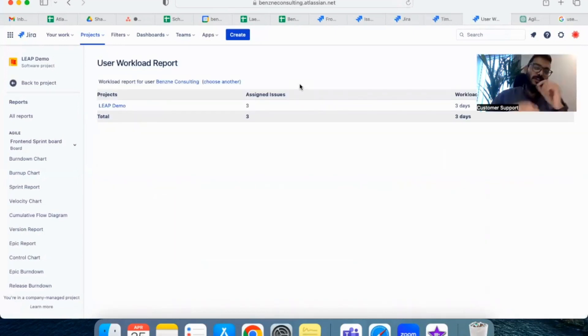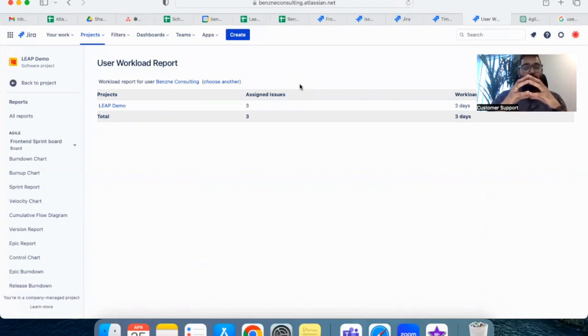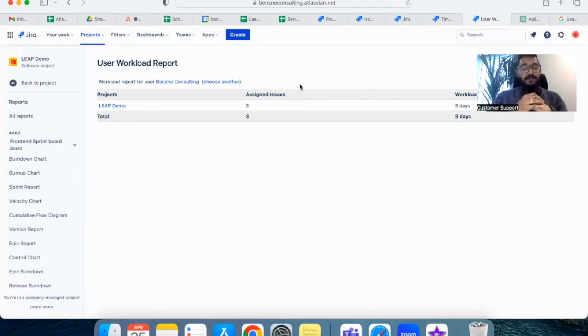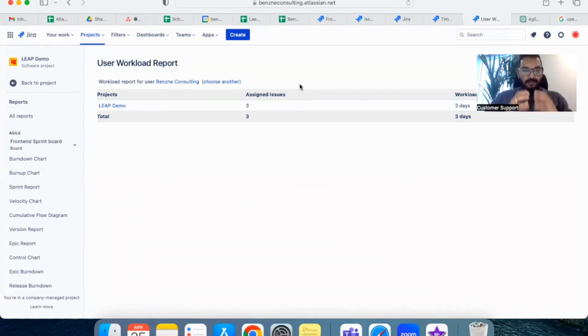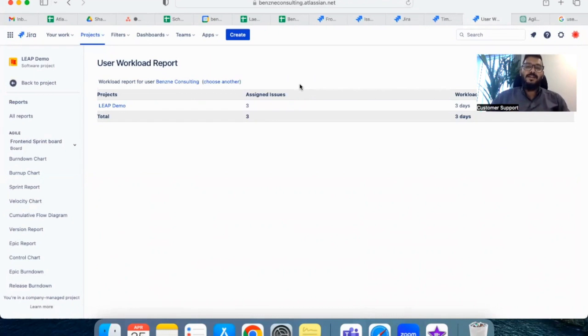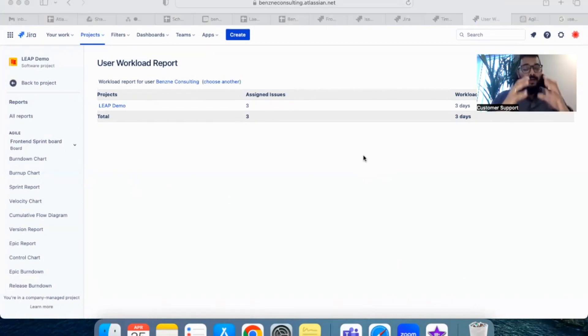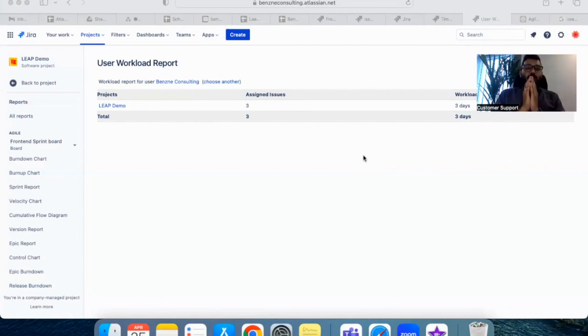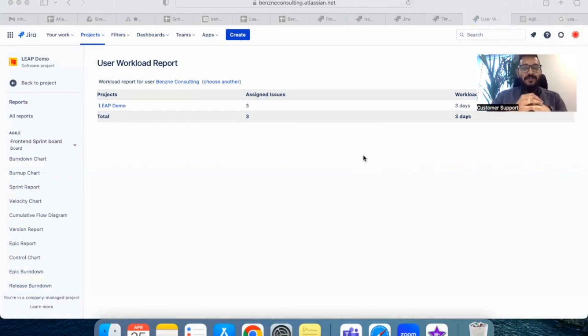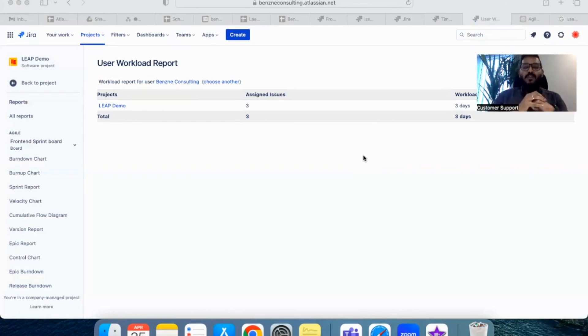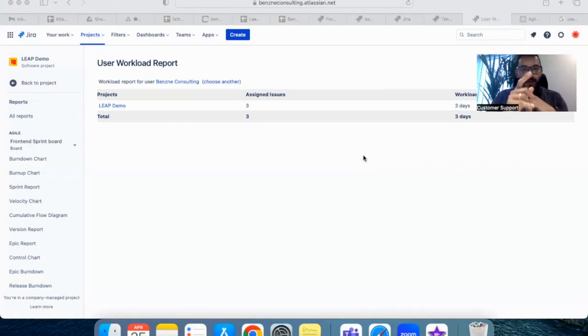On the other hand, user workload report can give you a report only for one user at a time. So with user workload report you might have to change or configure every person's name one by one and then understand how much time he or she has spent. But if you are looking at a report where you want to fetch how much time each person in your team has spent in a sprint duration, you might have to create something called a gadget in your dashboard, and I will show you how.